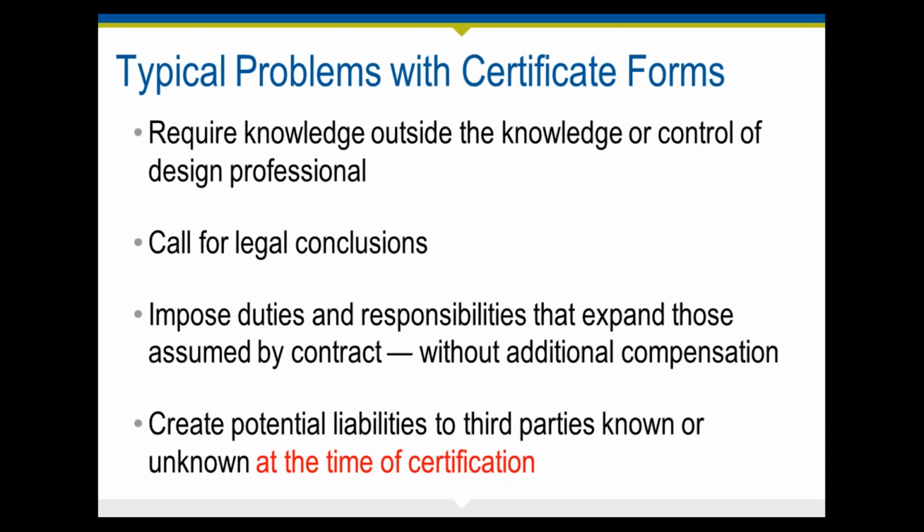And then finally, it can create a potential liability to third parties, known or unknown at the time of certification. So if, for example, you're certifying that there are sufficient funds to complete the project, you may not be in a position to know that. And furthermore, if you're providing that to the financier, that could lead you to a claim from the financier if there aren't indeed enough funds to complete the project. So it really doesn't make sense for you to assume responsibilities that you are not in control of.